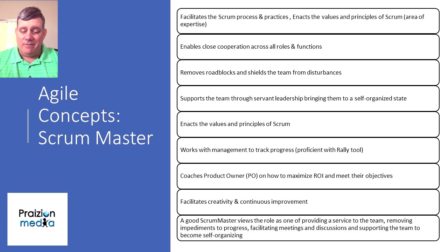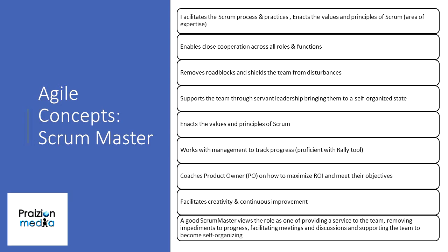As a matter of fact, even down to the task level, I would just say to the product owner, just throw in a high-level user story and let them go. Let them put in the tasks they need to get done, because they know better than us how it gets done. And pretty soon it makes all our jobs a lot easier. They feel more empowered and it allows them to get their work done. And they also have a say in how long it's going to take, so we don't overcommit them to something that they just can't get done.